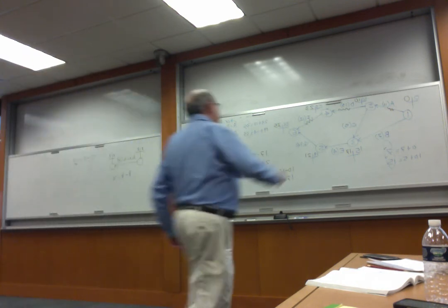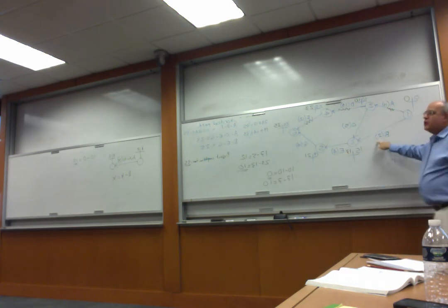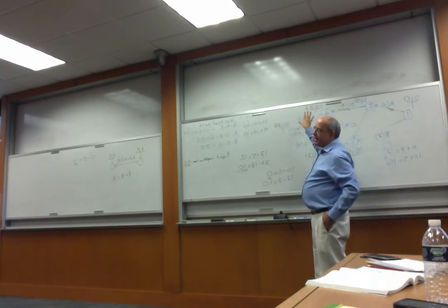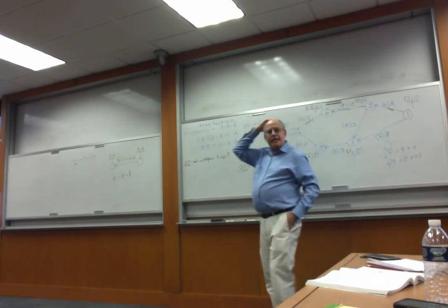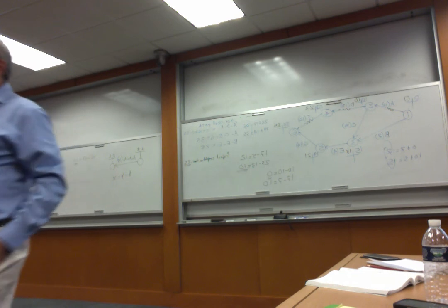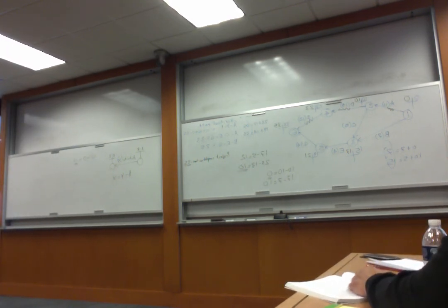There is a time window of 17, but the actual length is 7, so the cushion is 10. You can make it anywhere from 7 to 17 and still be on time, provided that everything else stays the same. This is the practical information that project managers take away from this: specific numbers for how long we can slow down an activity without slowing down the project.